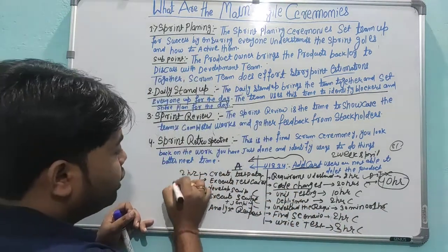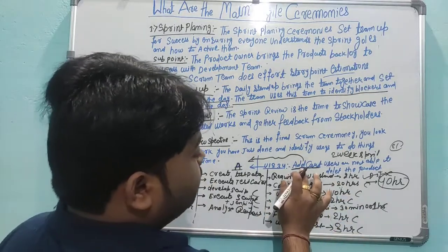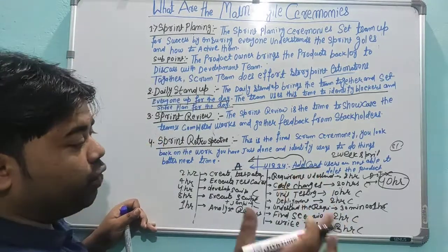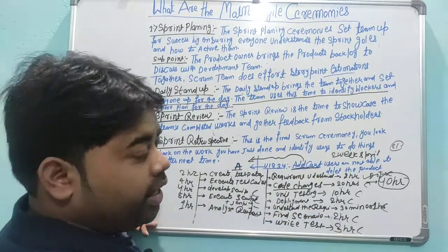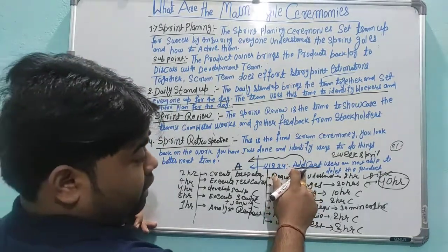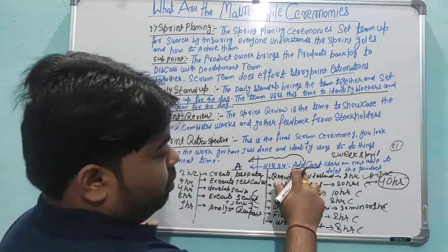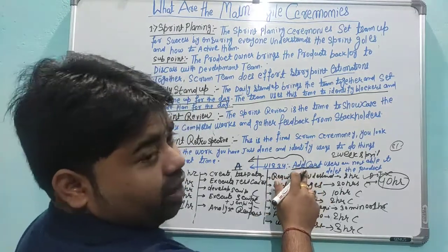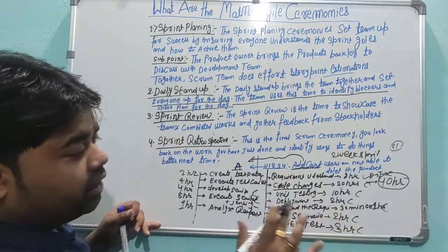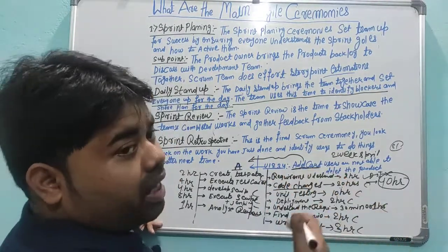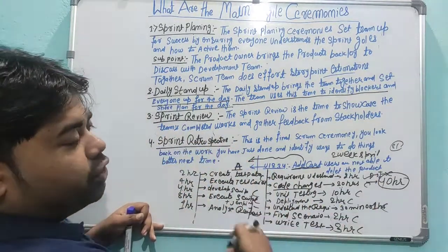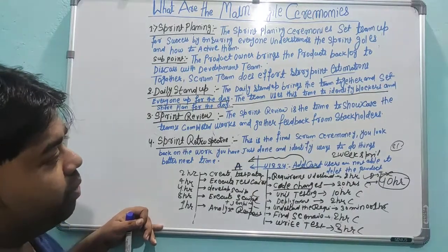Once your user story is done, then we have some review. This review might happen with your internal team. Your lead is going to review, or your manager is going to review, and sometimes we can review directly with the client. But we can do some internal review to check whether whatever we have done is completed as per the requirement or not. That is called a sprint review. So every user story, when it is complete, we have one review.